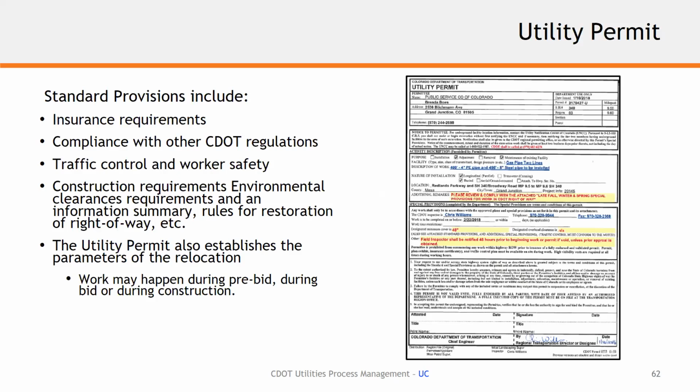construction requirements around environmental as far as stormwater, restoration of an area that is maybe outside the limits of disturbance for our contractors. So we may need restoration in those areas because if they don't, then it becomes a problem for our contractors when they do arrive to work, and it's not part of their contract to restore or re-veg an area. So keeping track of that, the construction management team is well versed on monitoring that for compliance as well. Also within our permits, it does have the requirement for as-built as well.